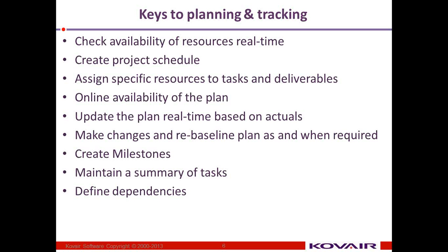And then is define dependencies. Now this is very critical, because if we don't have the dependencies properly defined, then in case of crisis we will not be able to do things like crashing the schedule or fast tracking the schedule.